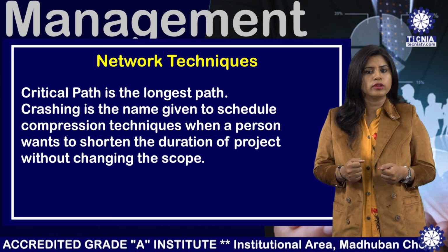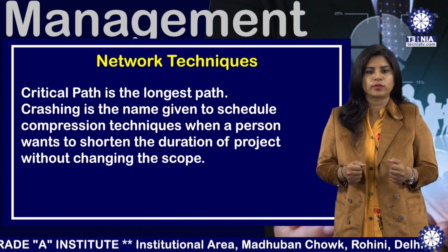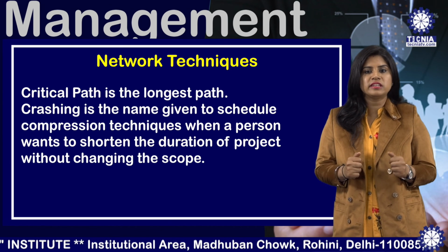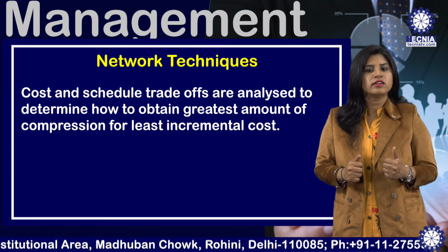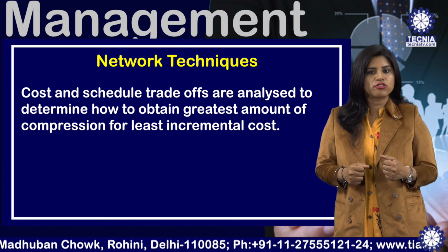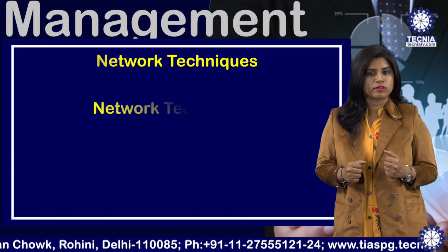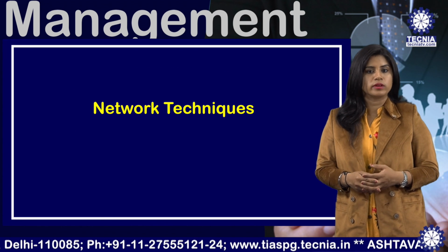Crashing is the name given to the schedule compression techniques when a person wants to shorten the duration of a project without changing the scope. Cost and schedule trade-offs are analyzed to determine how to obtain the greatest amount of compression for the least incremental cost. Now, I hope you have understood the concept of network techniques.